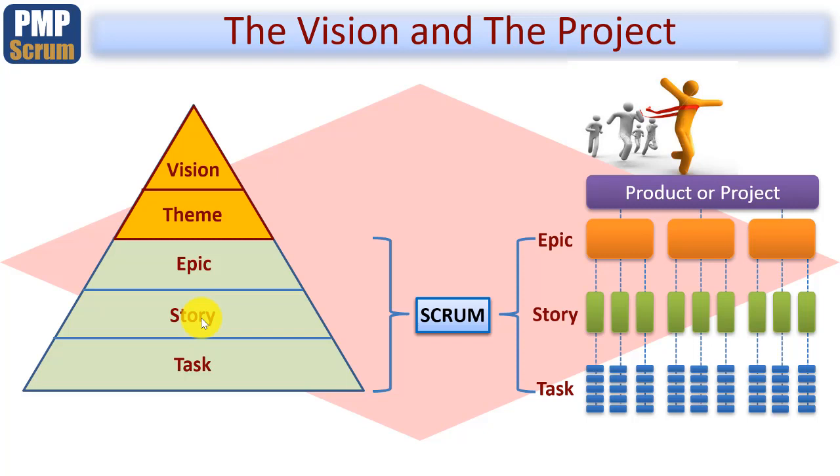Do you remember I said at the top of the product backlog, you'd have the finer details, the well thought through features, and as you go down the product backlog towards the bottom, those features may not be fully understood yet. Indeed, they might be quite large because we don't have enough information to break them down into smaller enough chunks to become suitable for use on sprints. These are sometimes called epics. So epics are a temporary version of basically one big large feature which we don't know enough yet to break down further.